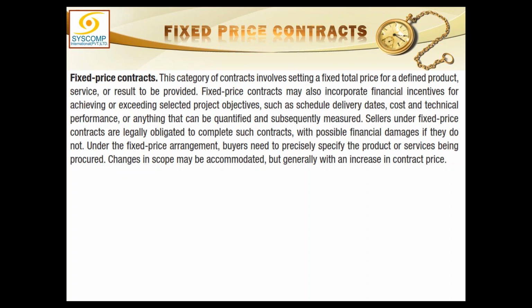These types of contracts are only good when you have clearly defined specifications and requirements, and the scope of the project is pretty much sealed.